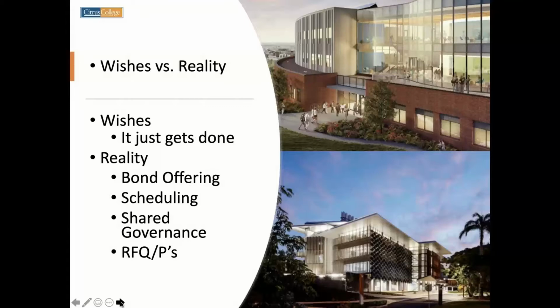So the scheduling portion is quickly tied into when you are actually going to deliver your buildings, taking into account how long it takes to build, how long it takes to design, how long it takes to go through the authority having jurisdiction, which in our case would be the Division of the State Architect. So once you have a master schedule on the building side, that would be the method by which you would derive your finance schedule.